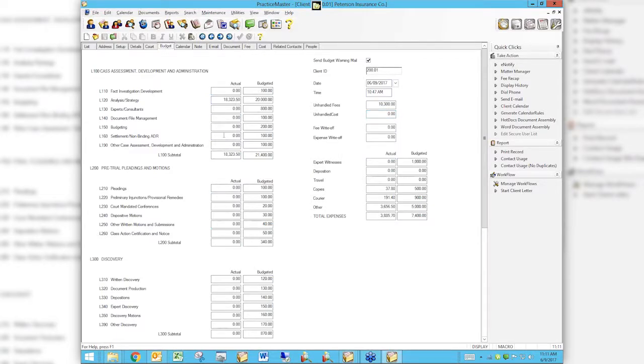These are costs and fees that don't fit into one of these categories that actually are in tabs having been billed for this client, or maybe not having been billed, but they're in WIP. Fee write-off and expense write-off. We all know about insurance companies and how they like to not pay certain small portions, or sometimes not so small portions, of their bills. Obviously, the most prevalent is we're going to pay you 2% less if we pay on time. And so what many firms will do is they'll bill the whole amount, and the insurance company will pay within the required time frame, and they will simply not pay that 2%, and you'll write it off. So as you do that, we need to keep track of that as well.